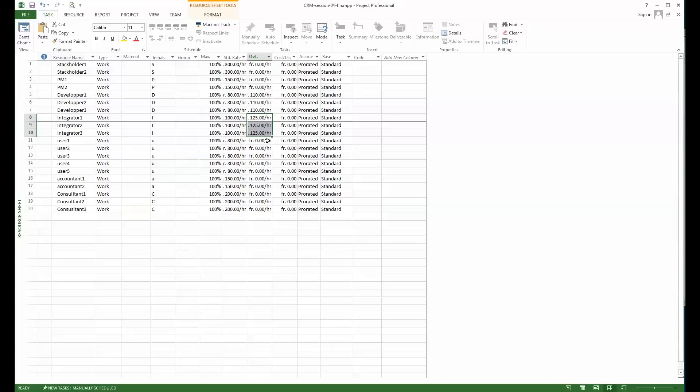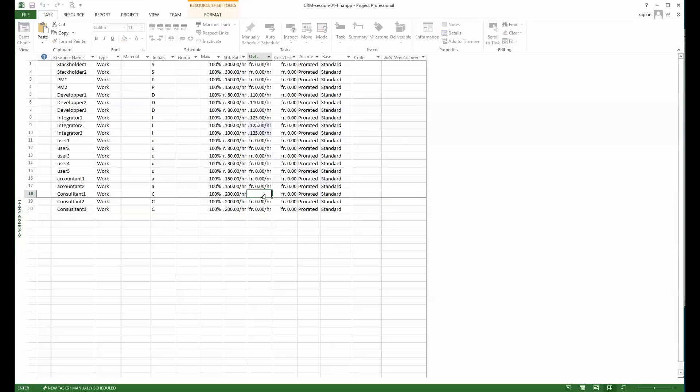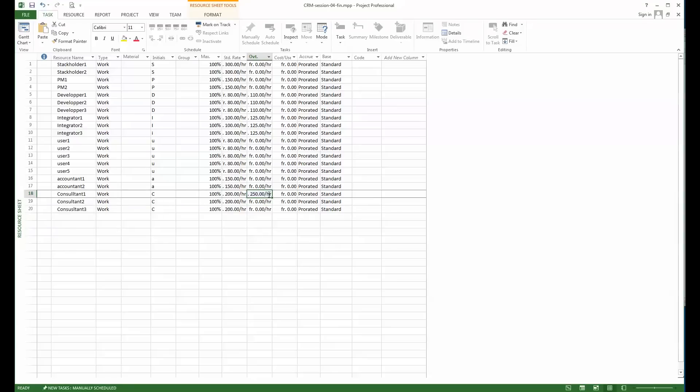Users, I'm not sure that we'll give them some overtime anyway, and accountants not. Maybe fix them with the consultants because there it could happen. So I would put 250 per hour if they do overtime.